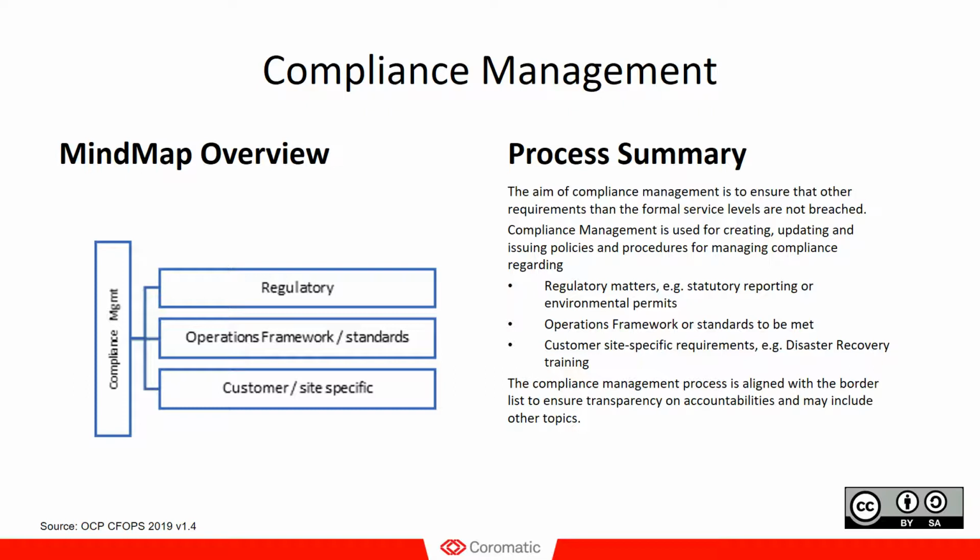Translating the regulatory paragraphs or sections that state this into an annual planner, making sure that every 10 years, or every 8 years if you want to over-deliver, the power distribution systems should be assessed by an independent third party, reported according to a specific format, and handed into whatever government agency requires it.